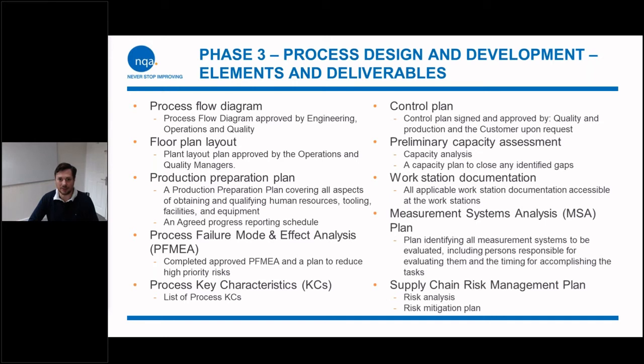Preliminary capability assessments. Have you got the capacity? What's the throughput expected? The volumes? People like Airbus, you know, they put run rates out there. 65 aircraft, there's 12 per aircraft, things like that. And then they give you a plan over 3 years. Now, I know not many organisations will give you a good schedule. You should try and work with them to get a schedule. If they are going through the APQP process, they should have given you a schedule anyway.